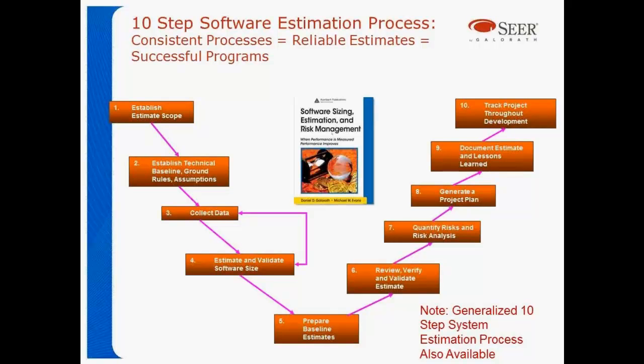What I do care is that the various components are done, that there's a logical progression, that the ground rules and assumptions are written down, that the sizing and the scope is done appropriately, and that after the estimates are done, the people verify that you can actually build the system, or if you need to go back and replan the system. So having a process for estimation and planning, we believe, is critical, and this is the estimation process. Next slide, Lee.